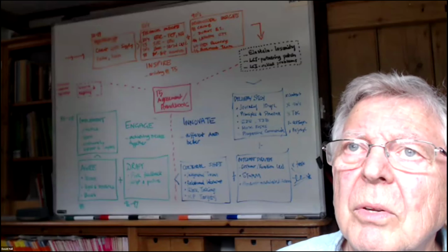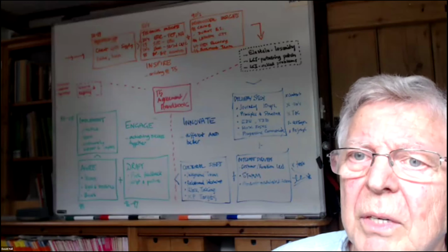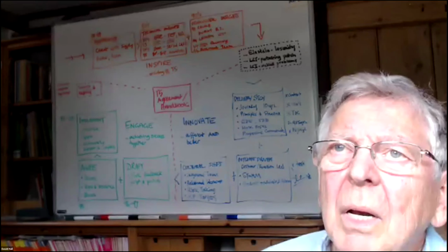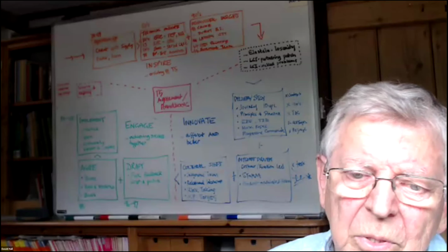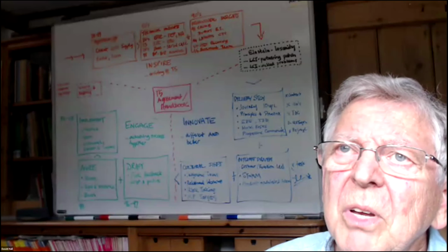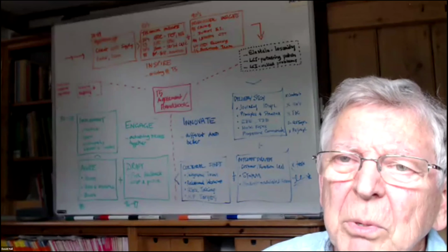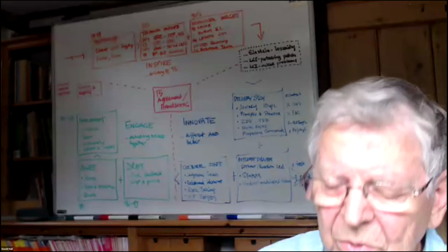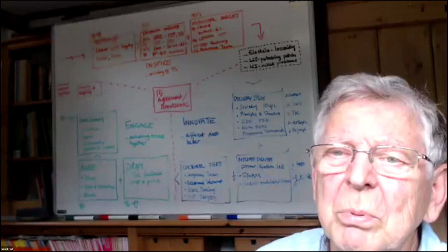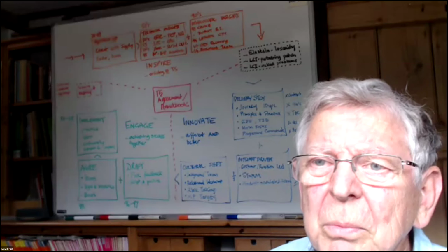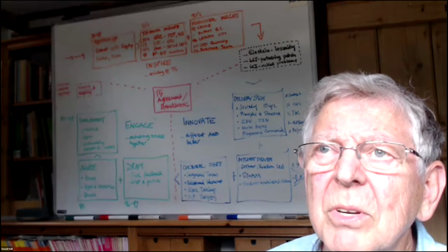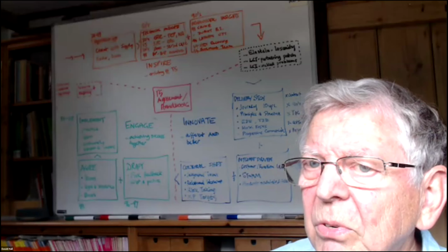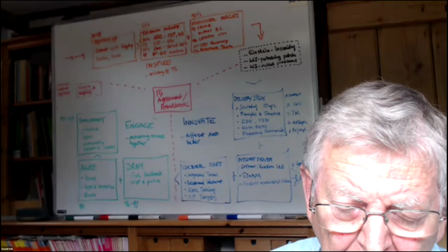recognizing that this was going to be 8 to 10 years before the first customers were going through. And in that time, there's going to be so many changes of people, changes of technology. When we first started Terminal 5, everybody used to buy their ticket at the terminal. By the time it was opened, only 2% of tickets were issued in the terminal. Everything else was bought online. The internet didn't exist when the original concepts were drawn up. So the whole concept of a terminal changed, and that had to be accommodated.